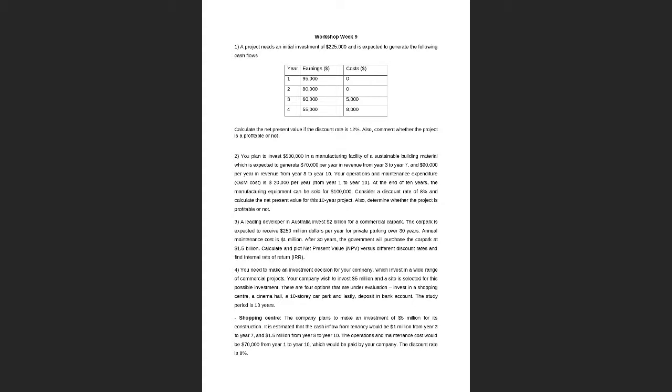Higher, right? Internal rate of return is basically, when a company is investing in a project, the rate of return they are getting on their investment. So the higher the internal rate of return, the better it is for the project. Two important concepts relating to IRR. Firstly, IRR is that interest rate where net present value is equal to 0, and a higher IRR is always better for the project. Okay, now let's have a look at the question.